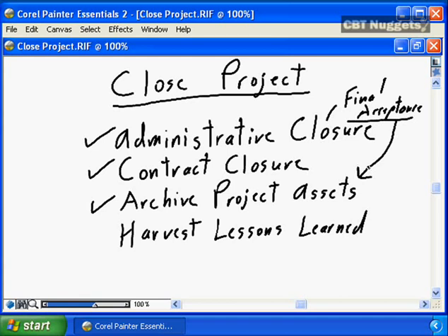As part of proper project closure, these artifacts, these assets should be archived, put into some kind of, I'm going to use the word permanent storage, that is going to allow future projects, future members of your organizations to go back and say, hey, that project that Steve did 2 years ago, it produced a system test plan.